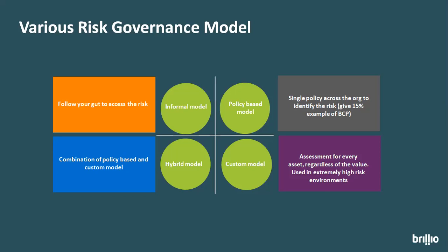Or from the project point of view, let's say in the team of 10, you thought that two people will actually drop off, two people are potential attrition cases. So how do you mitigate that? You do the KT, knowledge transfer, so that you distribute all their knowledge among the other 8 team members, so that even if they drop off, your project is not at that high a risk. Right? That's the informal model. You use your gut, a little bit of calculation, and you make your own mitigation plan.